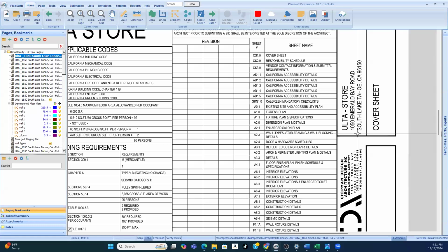So you've got a couple of choices. I just say you're supposed to price it for the date it's due. And then if you win, okay, you reprice it for the redo date, because they're always going to ask you to give them a new number, even if you helped them win with the number you gave them. Or you can just go ahead and add 25% or 30%, but then that tends to make you overbid, because somebody else may not be doing that.